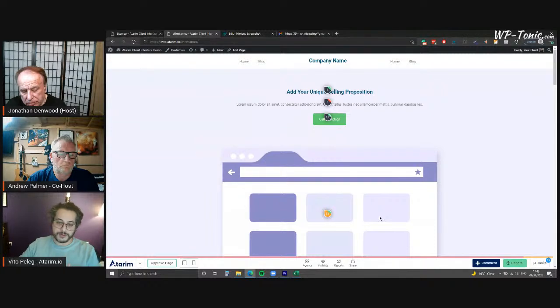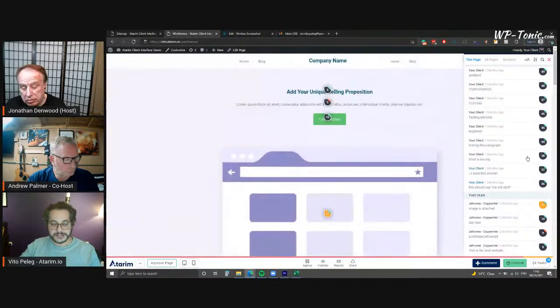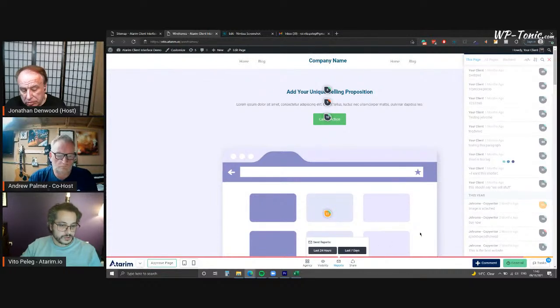Something that worked really well for us was doing Friday emails. Every Friday, we would spend 30 minutes per client going into their account in the project management system and checking what we did for them this week. What are we working on right now? What are we doing next? And we gave them reports of these things. With Atarim, we're fortunate enough to automate this: you can check a checkbox, and every Friday all of your clients get automated emails with the tasks you completed, as well as what you're working on right now and what you'll be working on next, based on the statuses. Or you can just drop in a report straight from here.